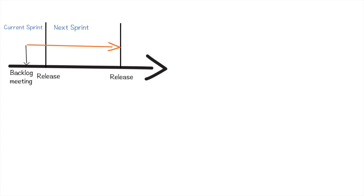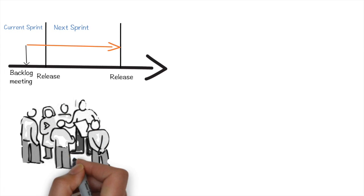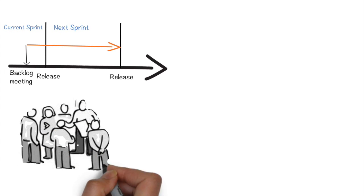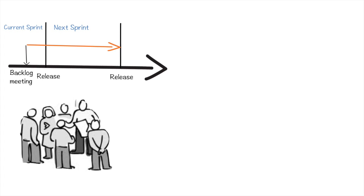The maintenance team discussed with Trade Bull and asked if they can give requirements for the running sprint itself based on their daily analysis of issues. Trade Bull team considered this request and in the interest of the customer decided to go ahead and accept the requirements in the same sprint.